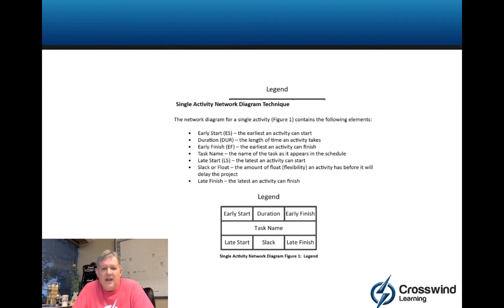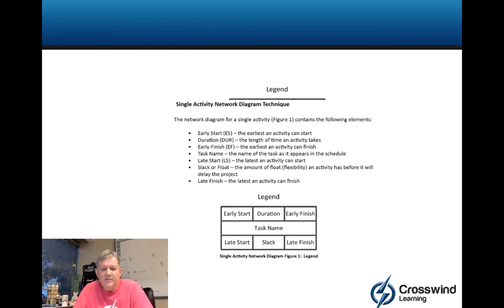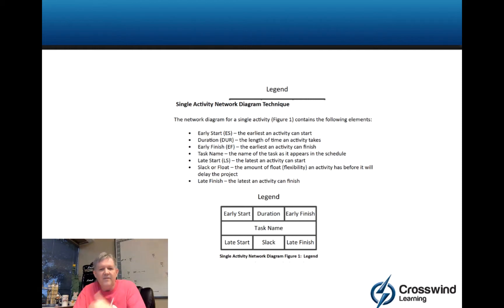The top left is always going to be the early start, the top right is the early finish, bottom left is late start, and bottom right is late finish. Think of it this way: early is at the top, late is at the bottom, start is at the left, finish is at the right.